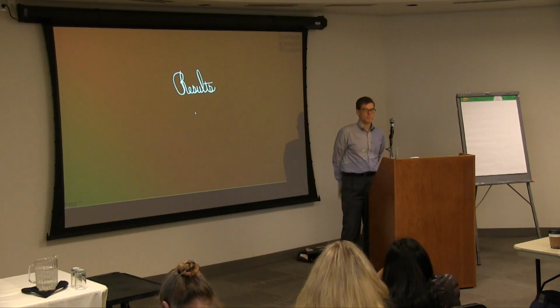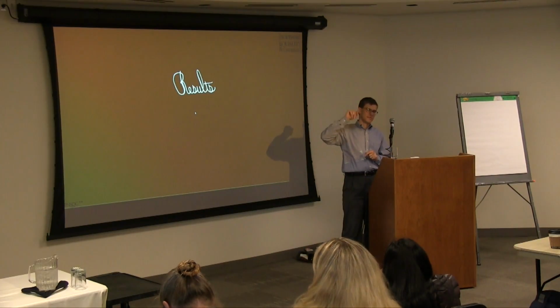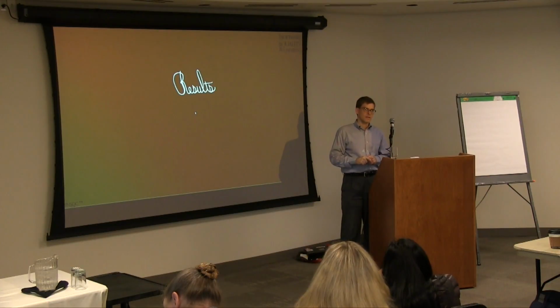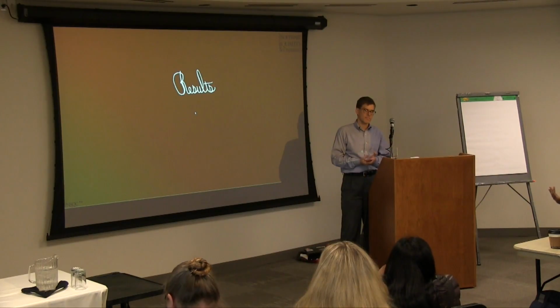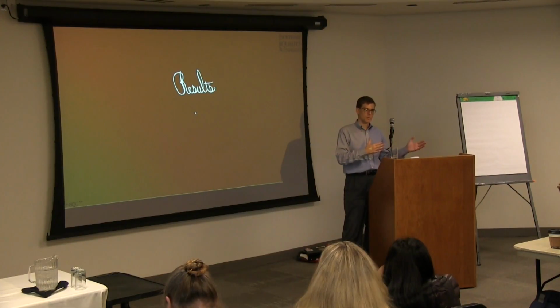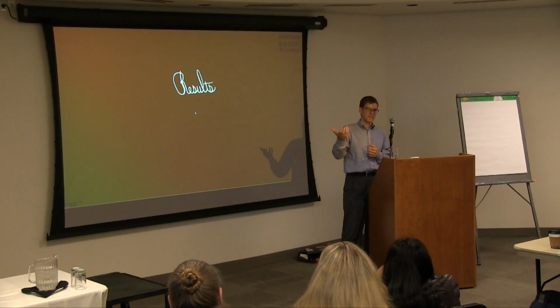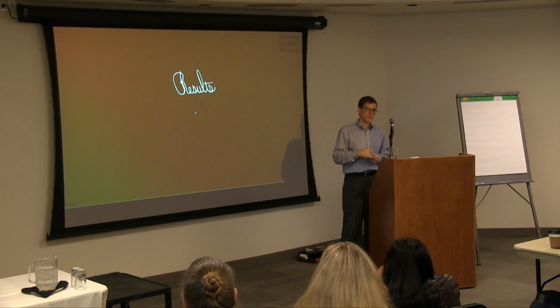So that's one of the benefits of breaking it up into two different vectors. It's not just sort of high risk, in the abstract. The impact and probability are separate. And they get multiplied, but somebody who's really risk averse could still game that to say everything is high risk. So the team is reviewing those. As I said, because we're working as a team, a sole stakeholder cannot simply declare something and the rest of the team be blind to that. So this is all done in the open. It's open to challenge for people to say, well, I simply disagree with your assessment, and we need to revisit that. And from one team to another, is it consistent?